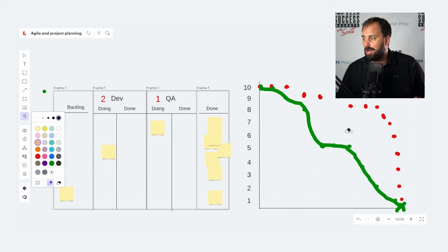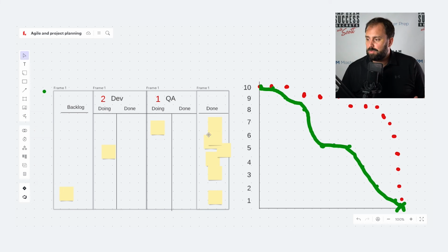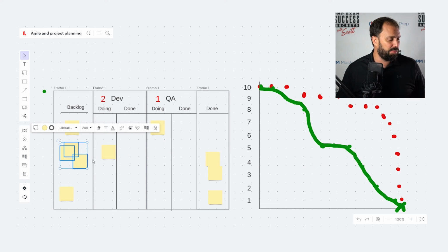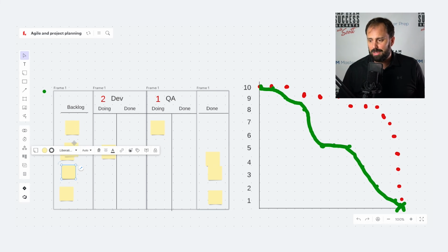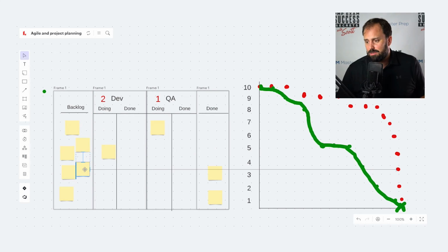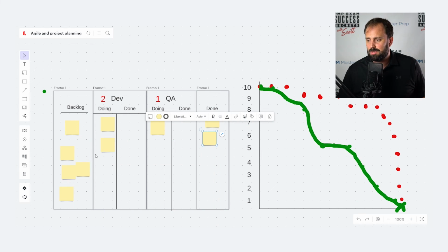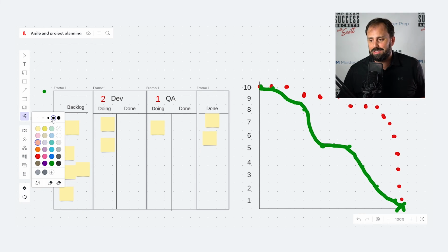All right? And so, let's say halfway through the work, there's a guy I like online named Paul Klipp. He's a practitioner, software company guy. I watched some videos on this, and it makes sense because this is the way we work. What if we get through here and halfway through there's some done stuff. One thing that he talks about is, how do you visualize how long work's been in the system? So what if we put a little pink circle for every day that something's been in the pot? Like this, maybe that took 3 days to get through.